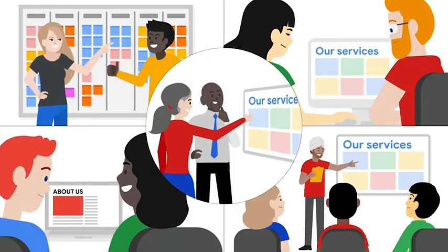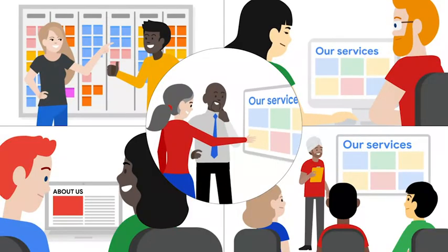An example of a project that would work well with an Agile approach might be building a website. Your team would build the different parts of the website in sprints and deliver each part to the client as they are built. This way, the website can be launched with some parts, say the main homepage, that are complete and ready for public view, while other parts, maybe the company blog or the ability to book online appointments, continue to get built out over time. This allows the team to get feedback early on about what works and what doesn't, make adjustments along the way, and reduce wasted efforts. In this same website example, the waterfall method will plan for and require the whole website to be complete before it can launch.